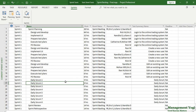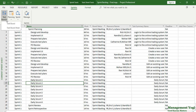The next key point: a number of agile practitioners ask me about the Task Board view — should they use it? The Task Board view and the associated Task Board Sheet view are typically used for a Kanban project, not for a Scrum project. You can also use it for a Scrumban project — that is, Scrum with Kanban. However, if you want to use it for your Scrum project, you can very well do so.